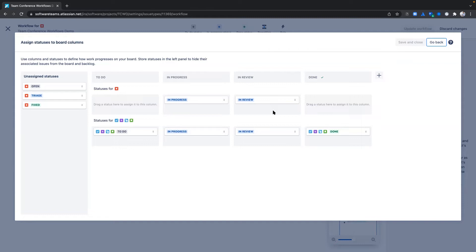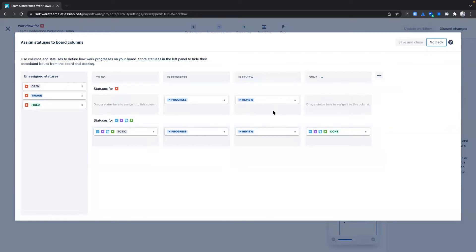We hope this will save you time when configuring your workflows. A board is a representation of a team's work. We assume that work moves from left to right as your team completes work. Thus, if your team is running sprints, we highly recommend that you map your terminal statuses to the last column on your board.